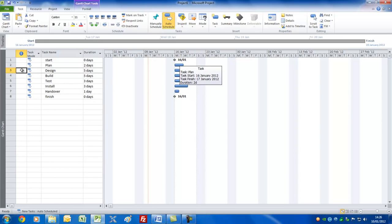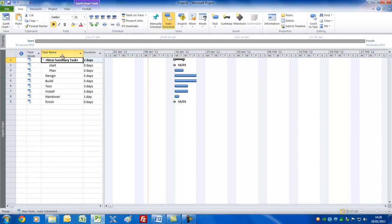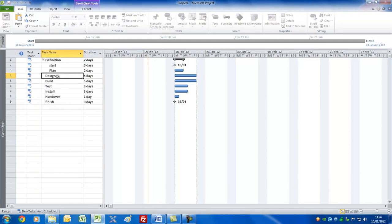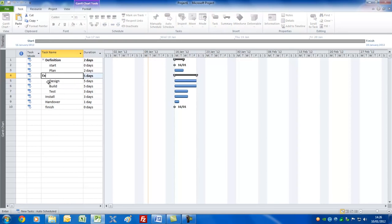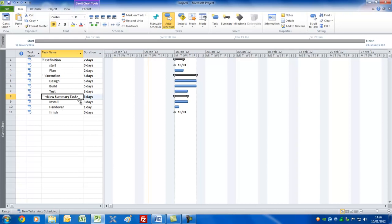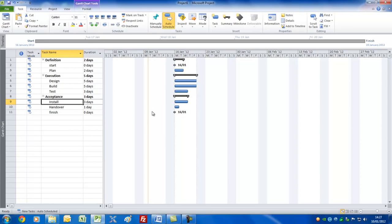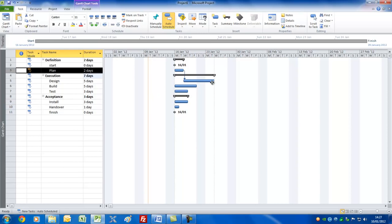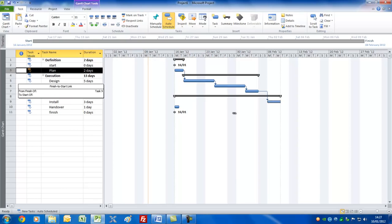For a normal type of project, you'd want to have summary bars to show the different stages or phases. The way you do that is to select the tasks you want underneath a summary task and click the Summary button. You'll see it inserts a new summary task — we'll call this the Definition Phase. I'll click underneath this and select Design, Build, and Test, and we'll call that the Execution Phase. Then the final one, we'll call this the Acceptance Phase. And there we've done it. Let's now link these together using the drag method.